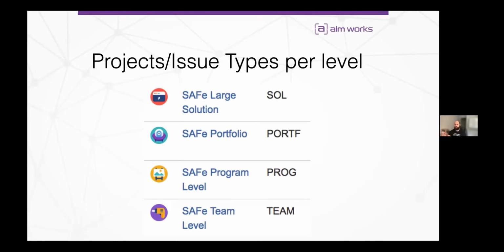And there's also a lot of conversation when you start implementing SAFe, whether you should follow the Atlassian hierarchy, which is initiative, epic, and story, or the canonical SAFe one, which is epic, feature, story. At this stage, I've also formed opinions on this. If you are on-prem, it doesn't really matter, to be very frank. You can tweak how Jira is configured to the point that you can see epic, feature, story and still retain a lot of the tool's power. You can go initiative, epic, story and be just as fine. As long as you're consistent across, it shouldn't matter.